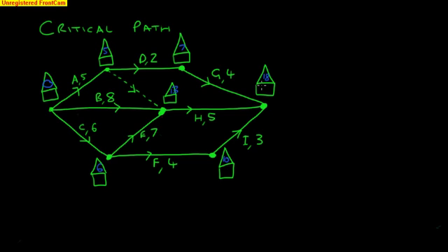When you've found the way that adds up to the most, and in this particular network, that would be coming down here and up here and then across here. That gives me the maximum time. That is the critical path. Now, all these numbers in the top are the earliest start times. For the latest start times, well, you can fill in down the critical path. The critical path, these two numbers will be the same. They always must be. That's 13, that's 6, and that's 0.